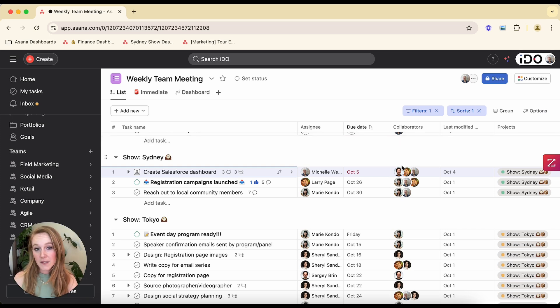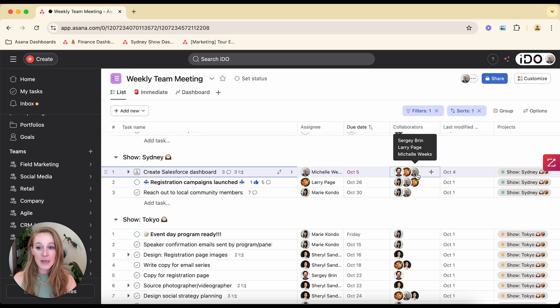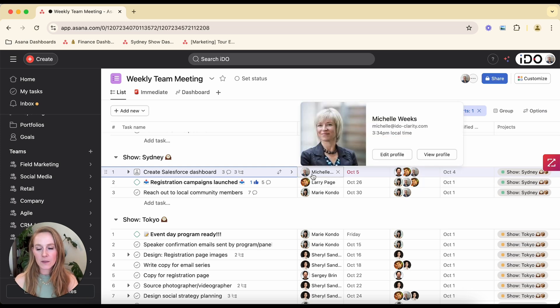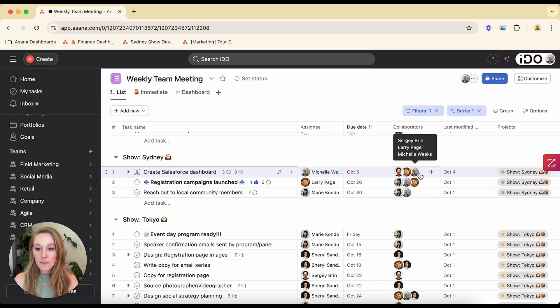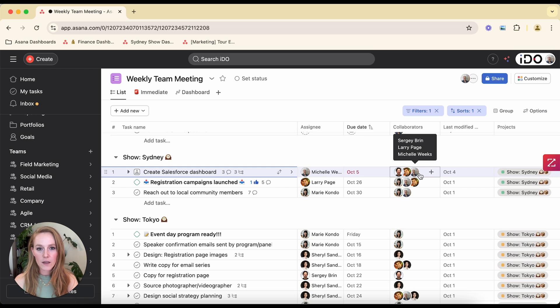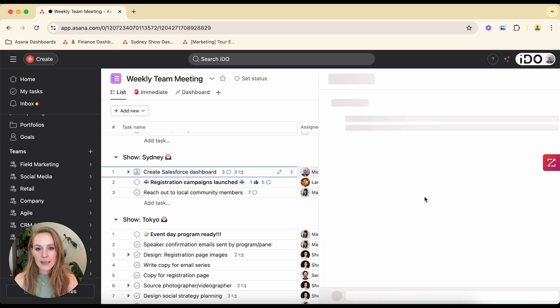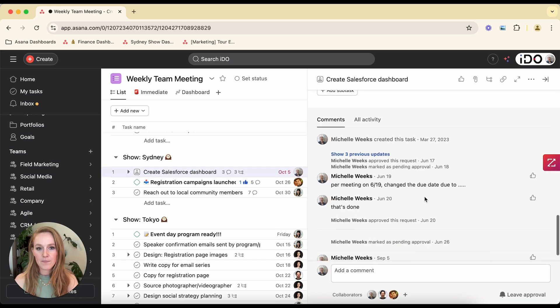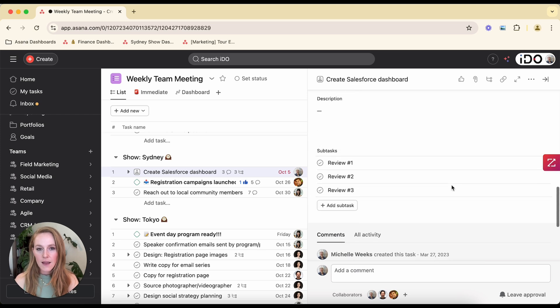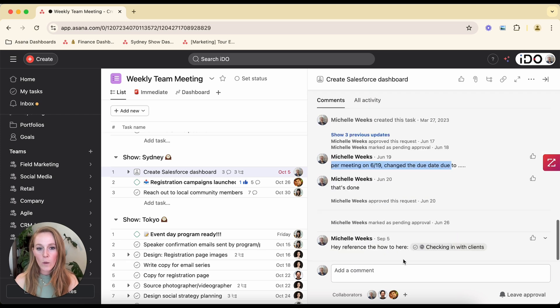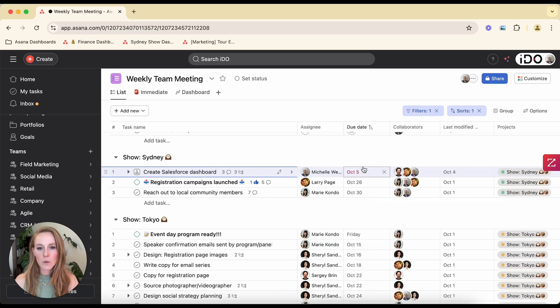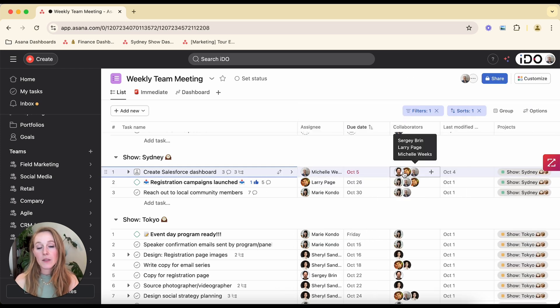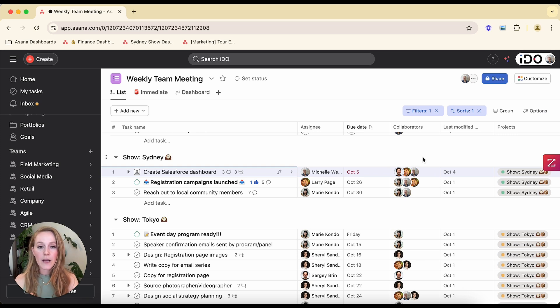Along with that, I want to also point out another feature. It's going to be my three B point here. What's called collaborators. So maybe Michelle is the one responsible to get this work done, but other people are impacted by it or need to know what's going on. Collaborators are all about notifications about this work. So when I want to know if Michelle has gotten this done, I can add myself as a collaborator or people can be added to be a part of the conversation. So you can have comments on these tasks and whoever is a collaborator on the task is going to get those notifications about what's going on. So this delineation between one person being responsible, but being able to add people as what's called collaborators is a great way to drive clarity in your projects.